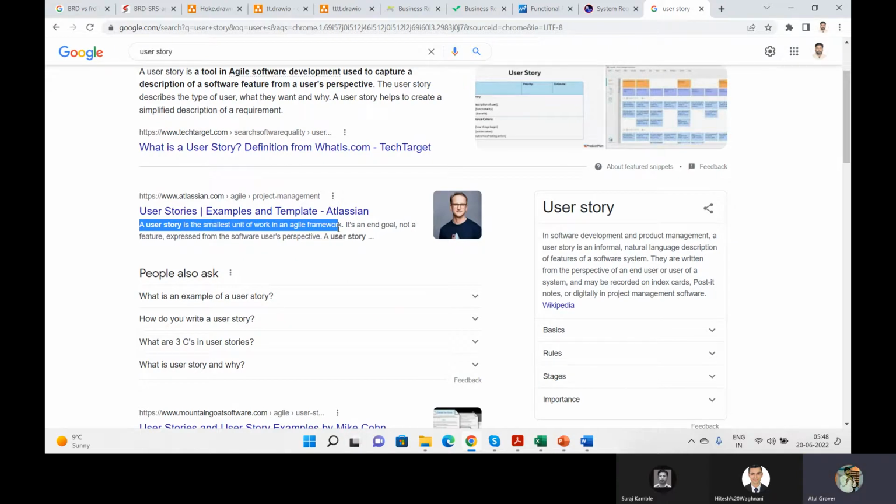सबसे छोटा पार्ट है। Like if I say guys I want to create a web page, ये तो बहुत बड़ा है। Then I divide that. In web page I want 2 fields, ये भी बड़ा है। Then I divide it. I want a field with the name called user need to be created in the table X. अब इससे आगे आप नहीं तोड़ सकते इसको, until unless आपके पास टेबल भी बनी नहीं पड़ी है।